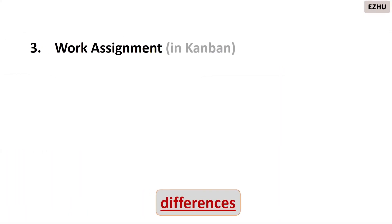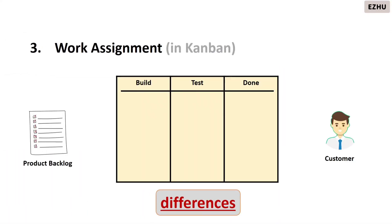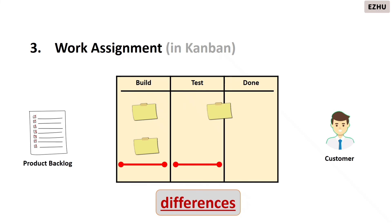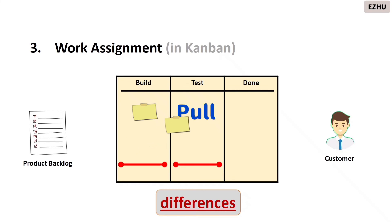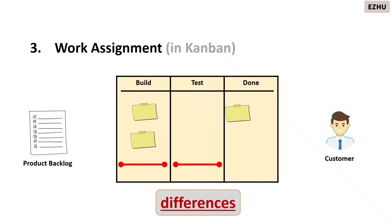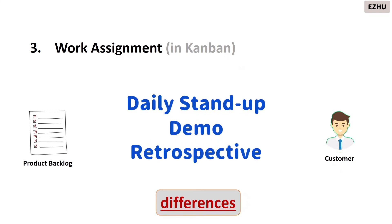In kanban there are no sprints and the work is managed differently — it is a continuous process and work is pulled based on the team's capacity. Once testing is completed, there is a pull trigger to the previous column to send additional work. Similar to scrum's sprint review and sprint retrospective, kanban also has similar ceremonies like daily stand-up, demo, and retrospective.